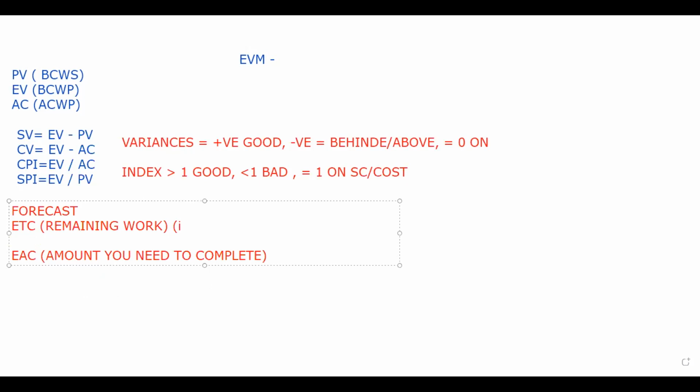One is for the initial rate. Initial means you are working with the budgeted rate; because of some delays or something that has happened, you will still work with the budgeted rate. So this will be considered as budget at completion minus earned value, the total work minus what you have achieved. If the question says current, or that you will continue as you are doing now, in that case, you will take the same formula and divide it by CPI.